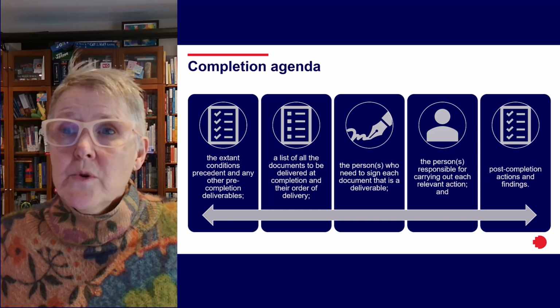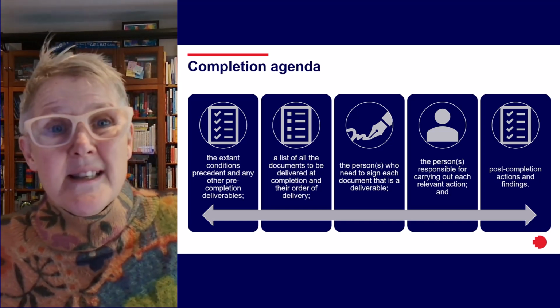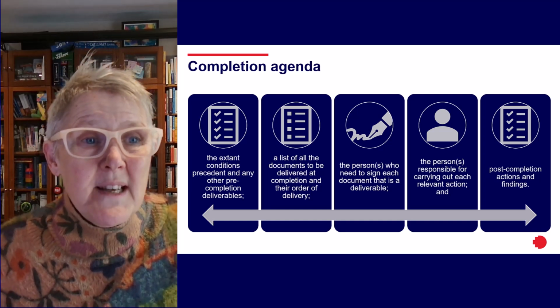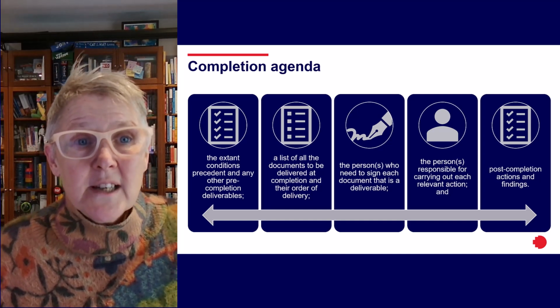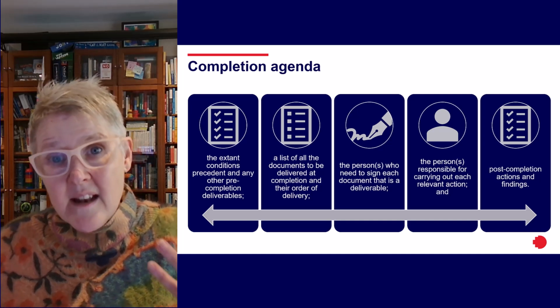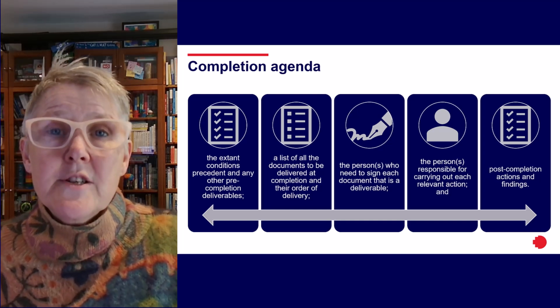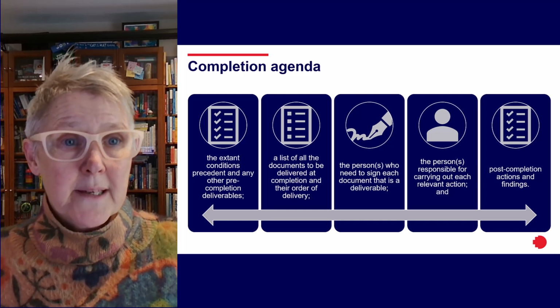It's quite usual to put together a completion agenda. So this is basically a checklist. Its purpose is to ensure that all the completion deliverables are identified, prepared, circulated, settled, and executed if they need to be signed, in preparation for delivery or handover at completion.